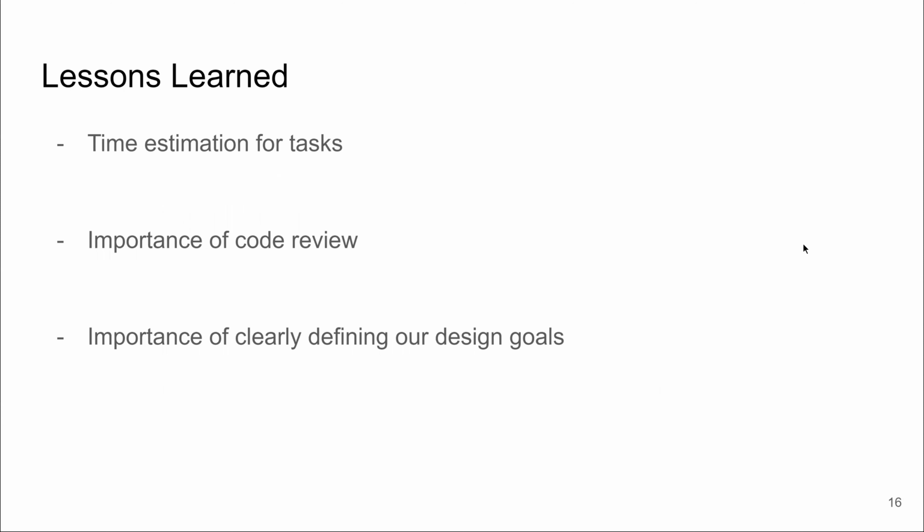And we learned a ton of lessons in this project, the main one being time estimation for tasks. We found that a lot of our tasks ended up rolling over to the next sprint just because we weren't able to time ourselves correctly.